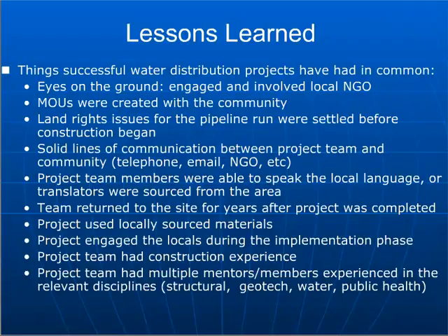As important as doing a good job of repairing that system is making sure that you've identified whatever it was in the process that caused the original system to break down or not function properly in the first place. There's always going to be some type of money required to maintain these systems. And if you don't have some type of fee structure developed and in place with the community, it's unlikely that these systems are going to operate very long into the future.